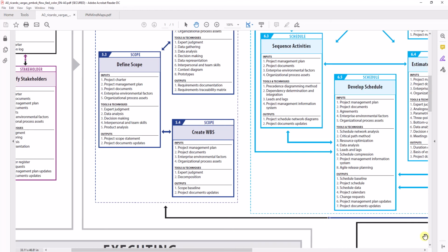Yes, sir. And then there is something called an affinity diagram, where you take the ideas you got in a brainstorming and categorize them under different headings or categories. That is called an affinity diagram. Affinity means relationship. So whatever data you got in brainstorming, you are consolidating under different categories so that you are able to look at commonalities, differences, and you can make some action out of this. So this is basically an affinity diagram.